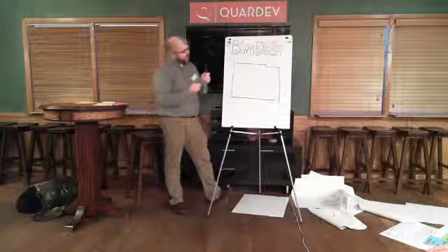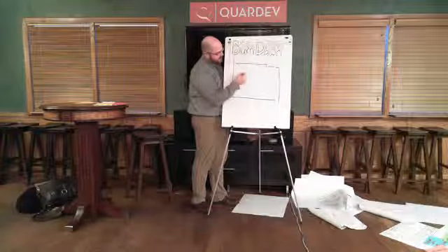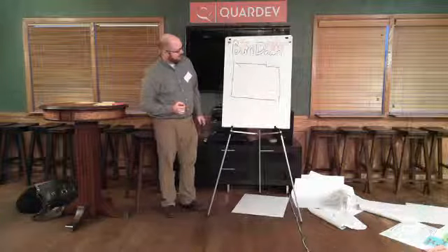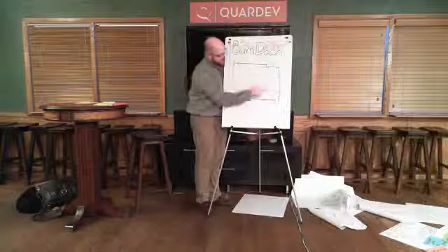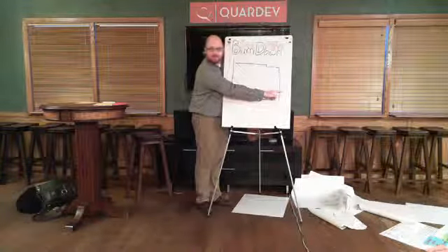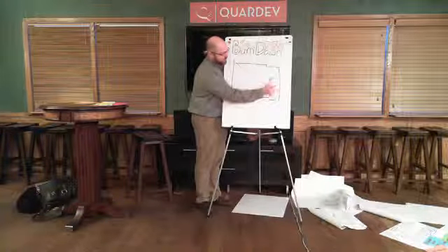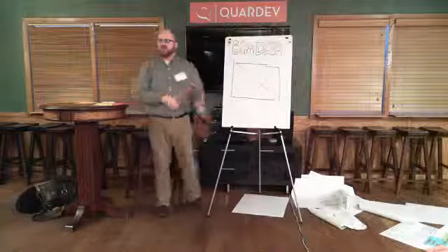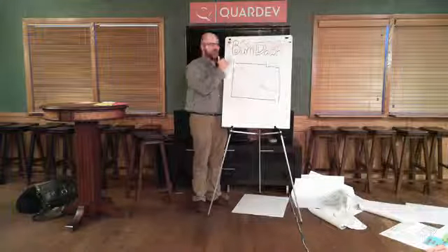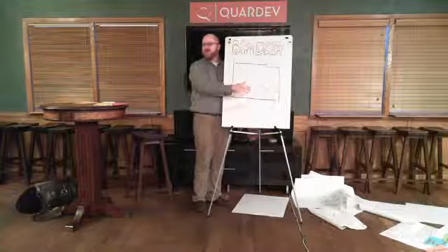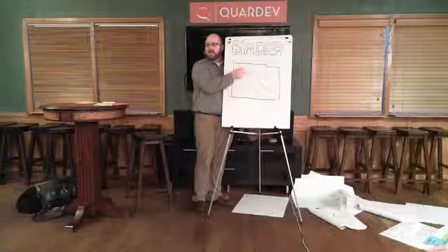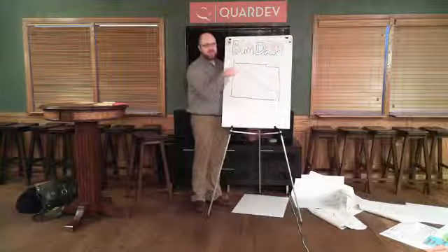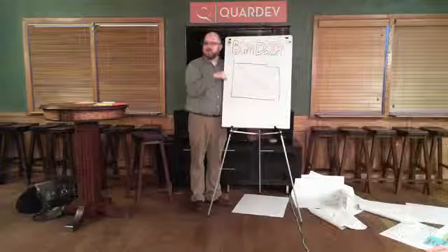So, another thing that people burn down is tasks or task hours. And have you ever had your burndown that looks like this? We totally built stuff, and then we started to test it. Whoops, we found a whole bunch of stuff right at the end of the sprint. And just because you did all the tasks doesn't mean it works. That's the problem with tasks. That's why people go to story points. But task is more granular, it gives you more feedback. These are both useful, and I work with a lot of teams that just use both of these so that you have some sense of it.